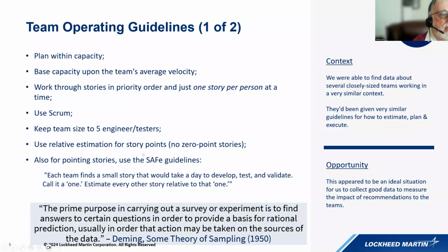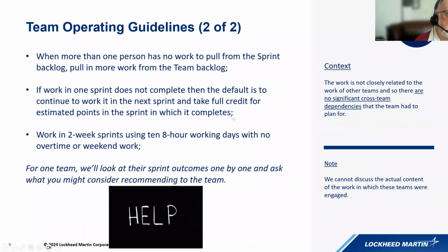There'd be relative estimation. I won't go into story points, but there are relative estimation sizes rather than using hours directly. Story points are a rough estimate of how much time something's going to take, how much effort it's going to take. And for one story point, we chose that we said that would take about a day. And that was part of the definition.